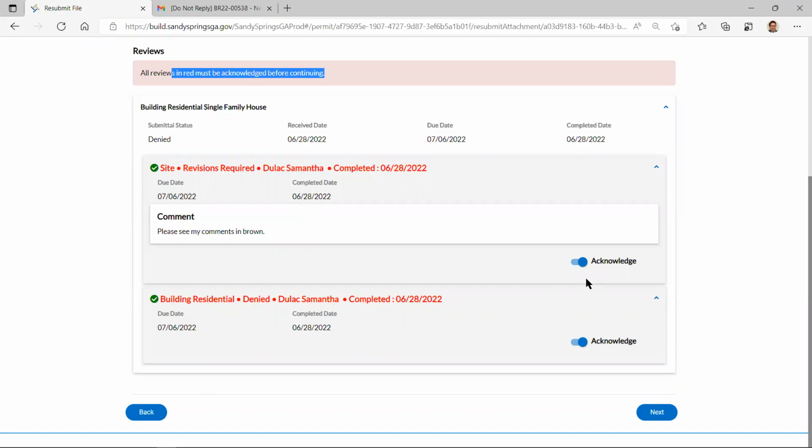No, so we're trying to get away from provide. In the past, we did have a separate document that had a list of things, but we're trying to get away from that because it's just one more document to get lost. It doesn't get to your design team. We noticed a pattern that they didn't necessarily see all the comments, whether some were on the drawings and some were on an 8.5 by 11. So we're just trying to put everything on the drawings because in the design world for the architects and engineers, that's how everybody does it. You mark it up on the drawings, you give it back to the drafter, they make all the corrections, they send it back. So we're trying to do the same thing like everybody does in the real world.